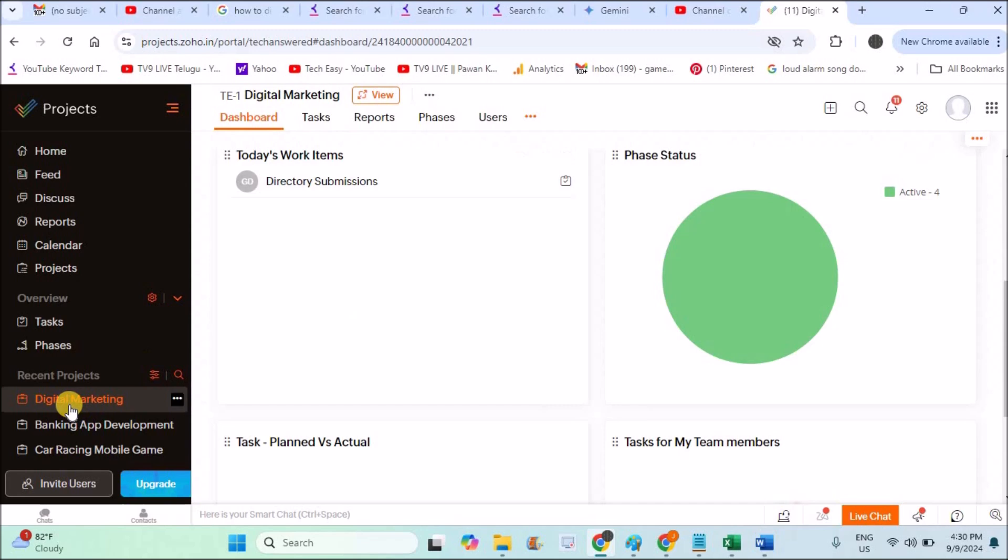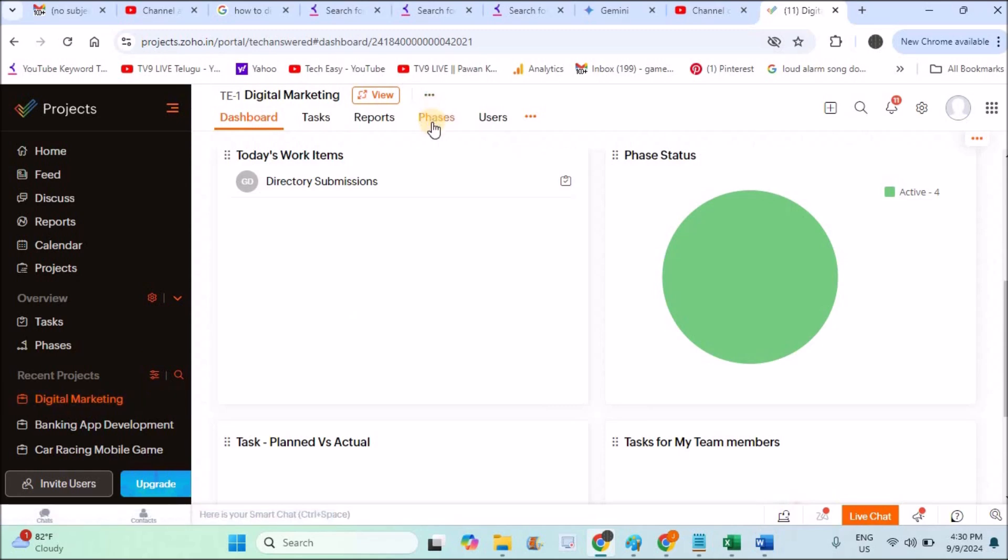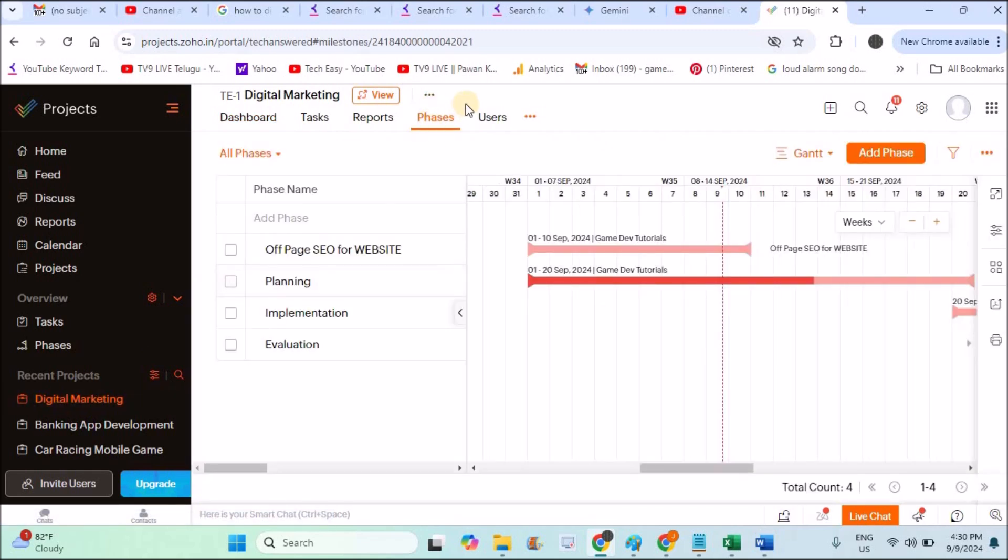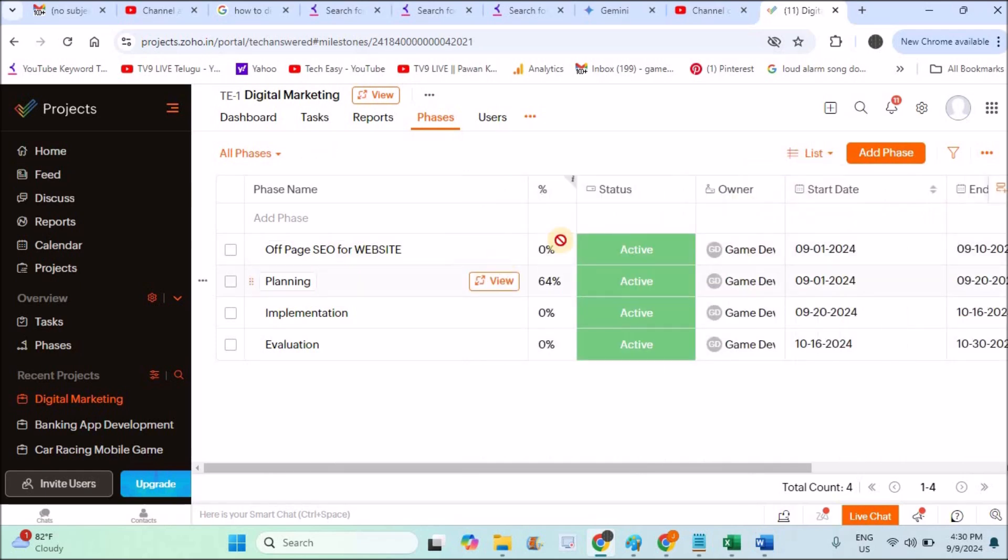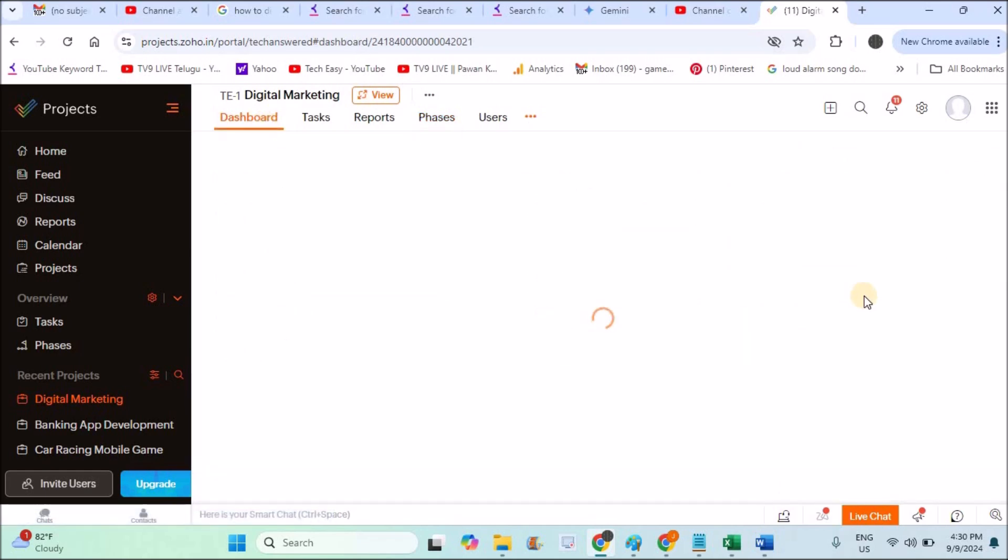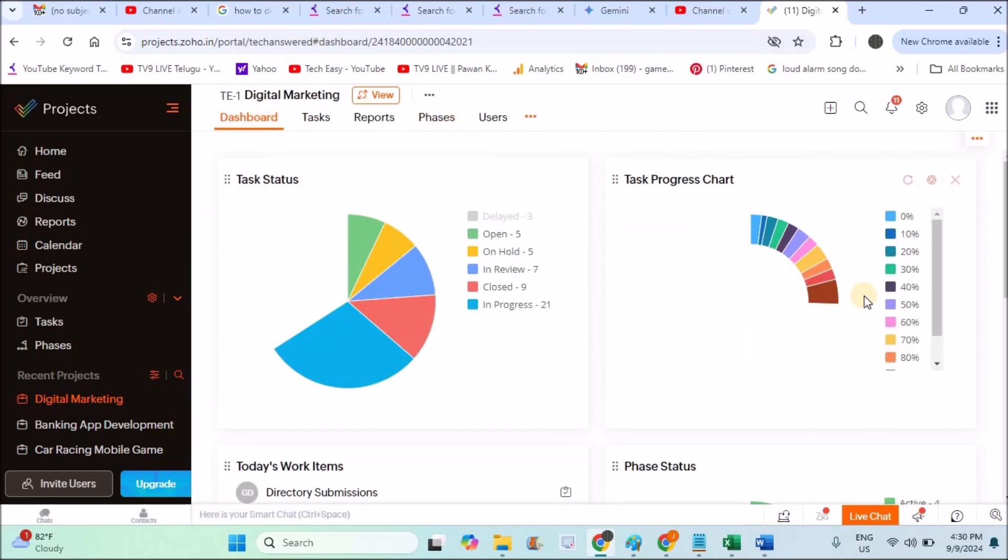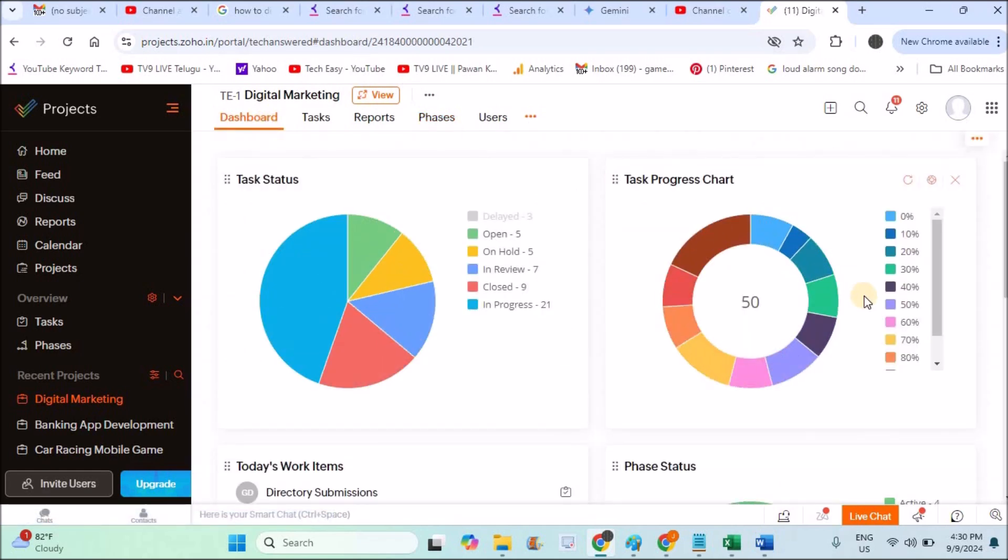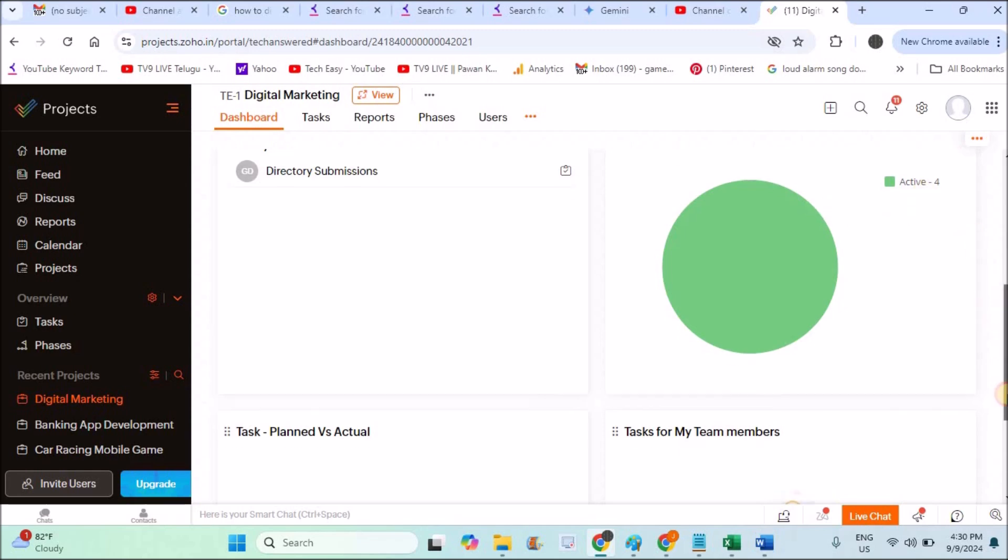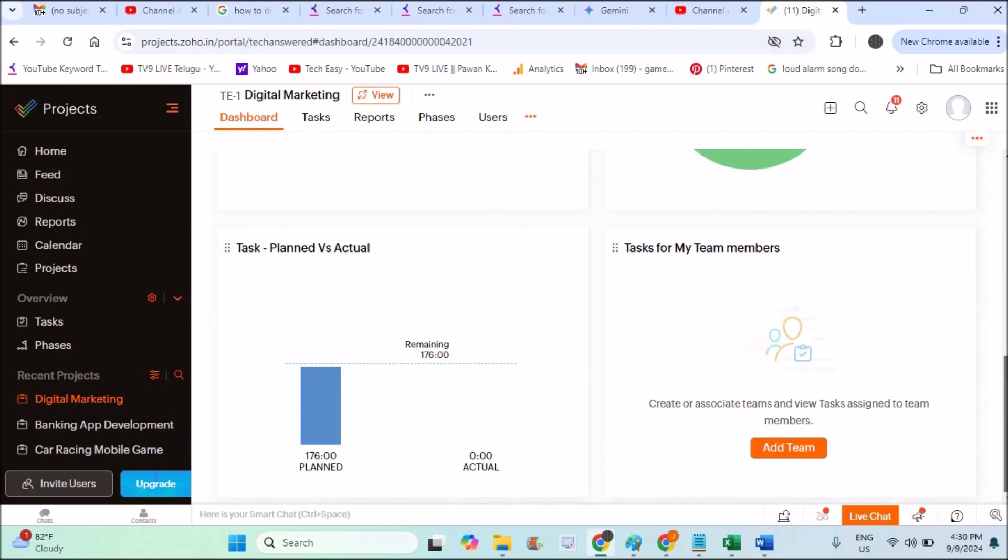It will be shown here as the phase status. Currently all four milestones, if I click on the phases or milestones, I'll click on the list view. No phase is 100% completed. That's the reason on the dashboard it is saying all four are active. All four milestones are active. None of the four is already completed 100%.